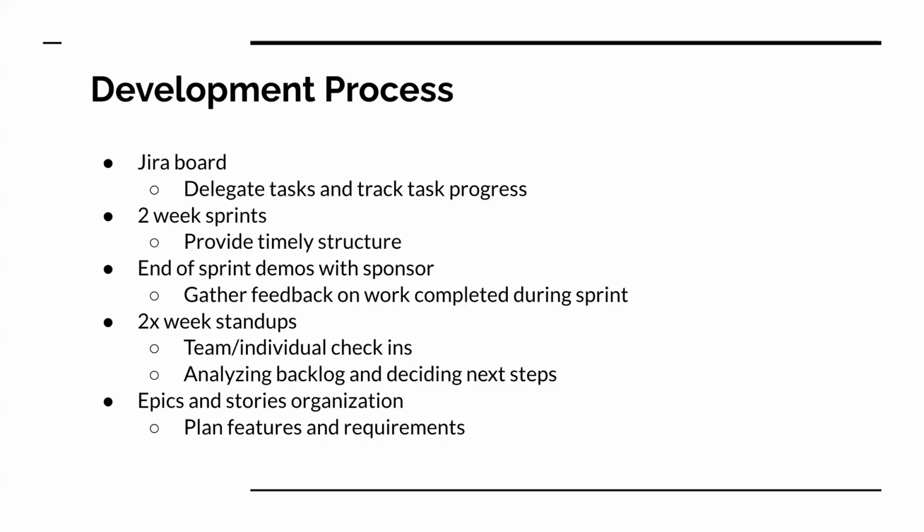We had stand-ups 2 times a week for team and individual check-ins, as well as to analyze the backlog and decide our next steps. In Jira, our features were organized into epics and stories in a hierarchical fashion so that we could prioritize and plan features and requirements effectively.